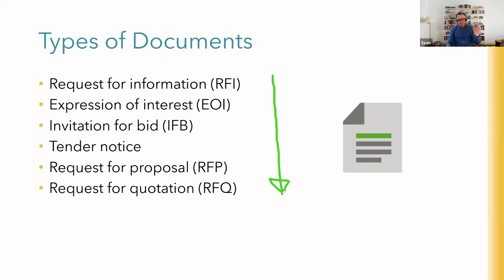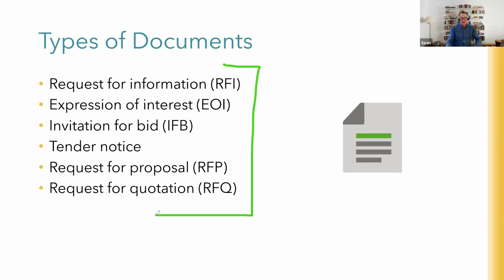or just go out to the local supplier. A lot of organizations have policies like anything under $5,000 or $50,000, you can just go out to your preferred vendor with a purchase order or work order. But a lot of organizations have rules that if it's over $50,000 or over $100,000 or whatever, you have to follow these processes, and the procurement department will help you.